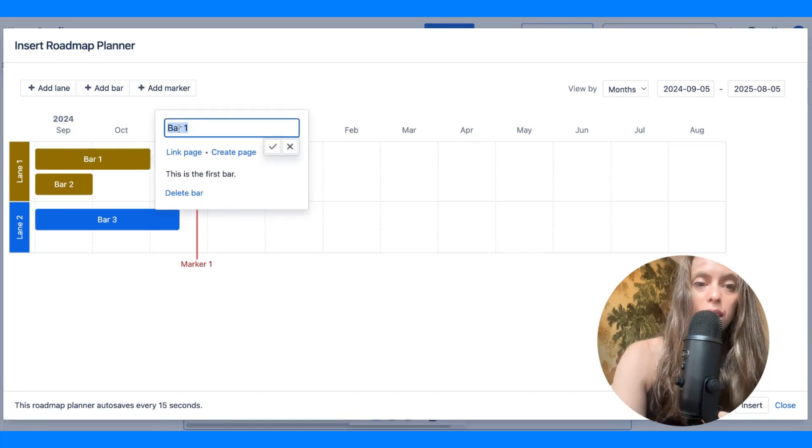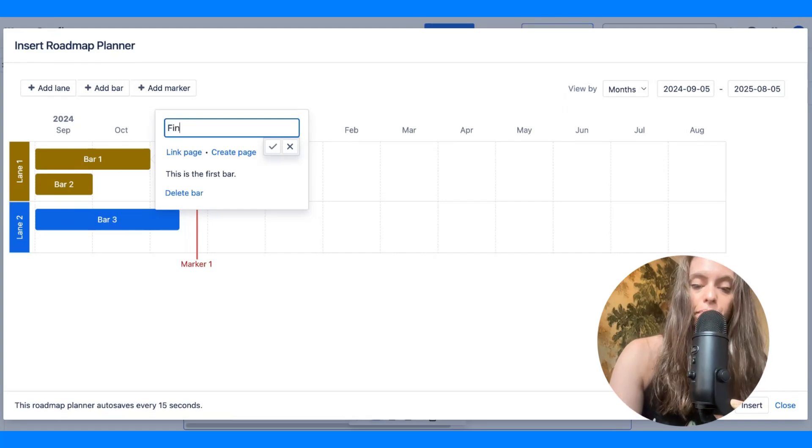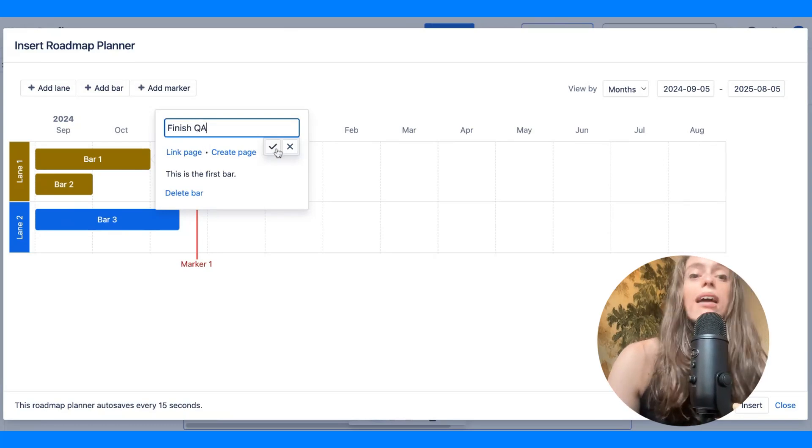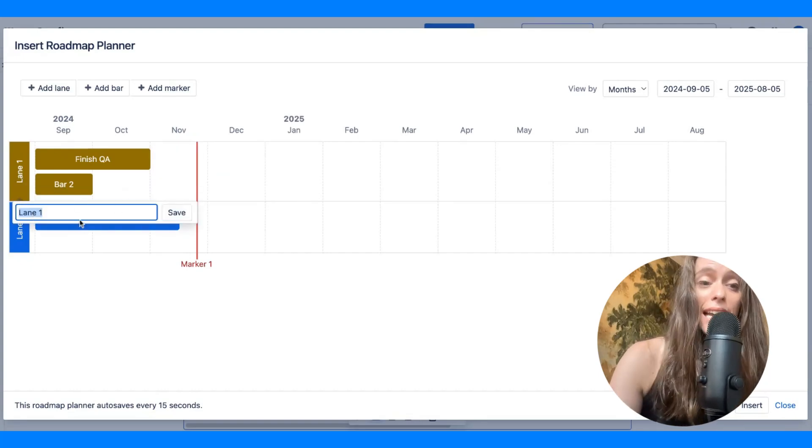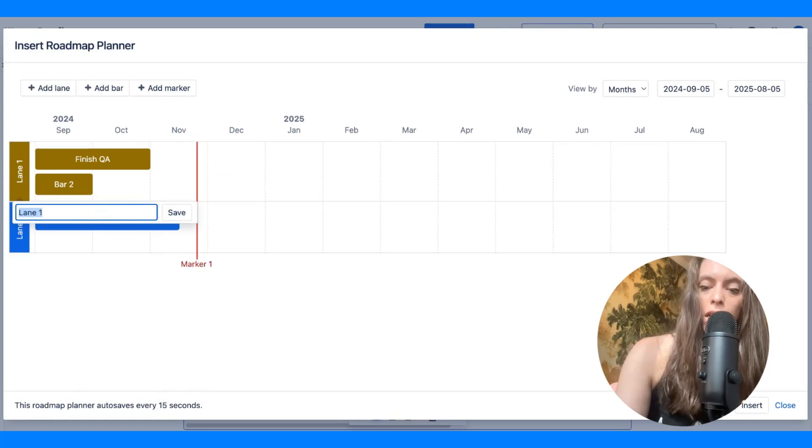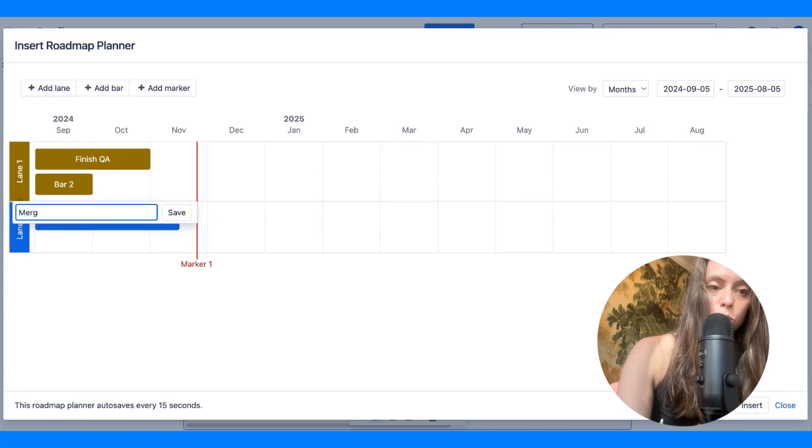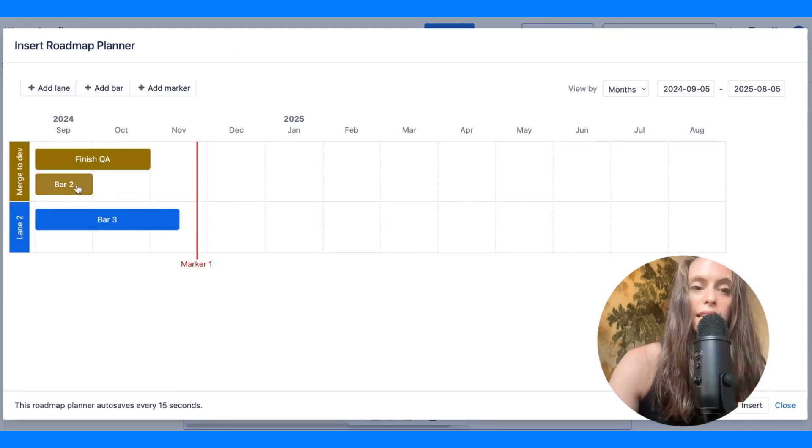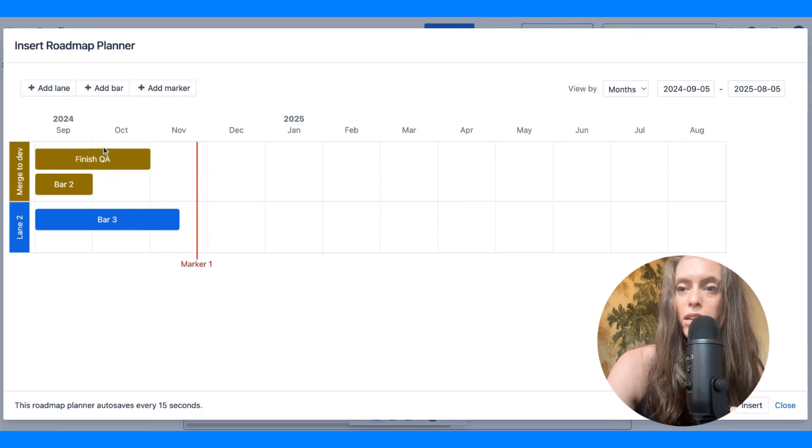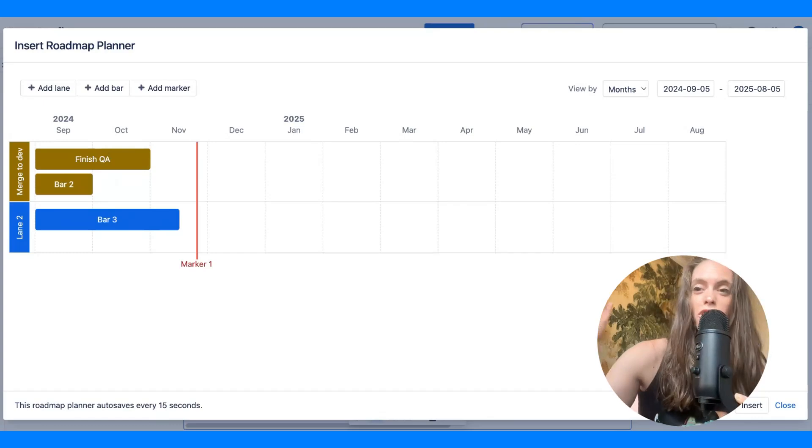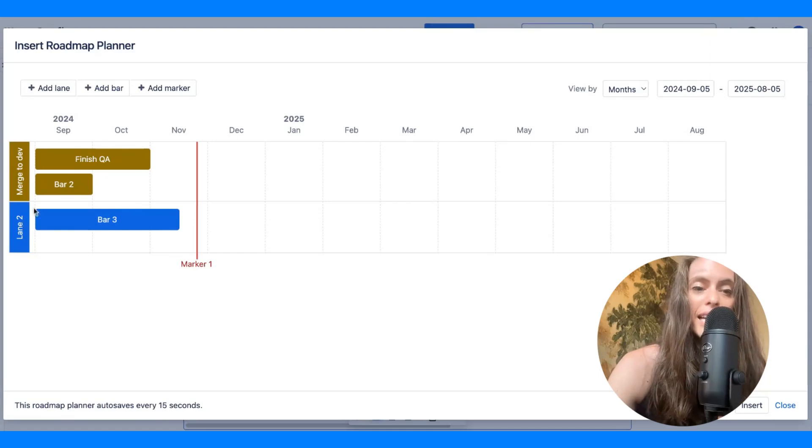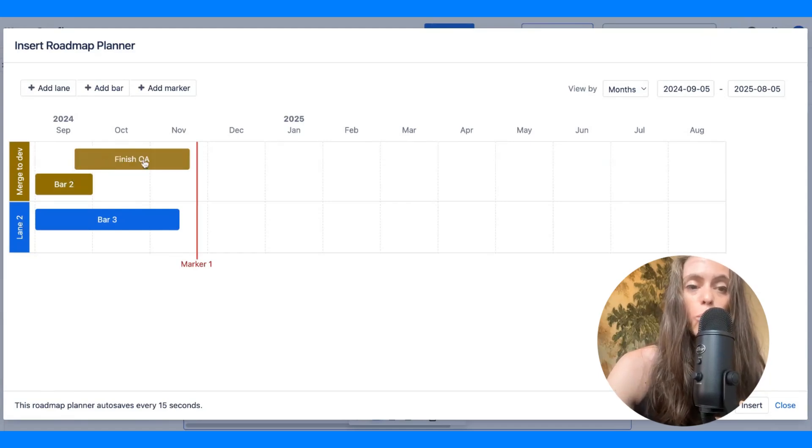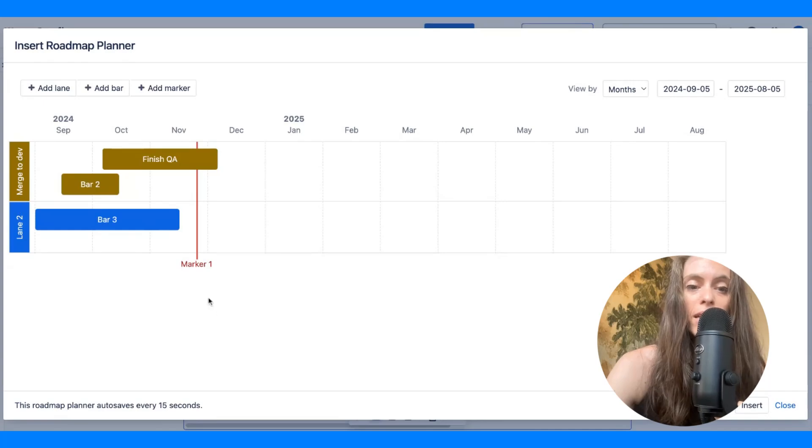So, in terms of making this into a Gantt chart that is helpful for you, number one, you can edit what the bars mean. So, let's say this is finish QA, or whatever task needs to be done. What if this lane we name it merge to dev, and that's just what this lane is called. All the things that need to get accomplished for merge to dev to happen, or let's just pretend the name of this project was Confluence Gantt chart video. All the things that would have to go into making this video. And so, you can have different lanes, which have different bars dictating what needs to get accomplished within each lane.